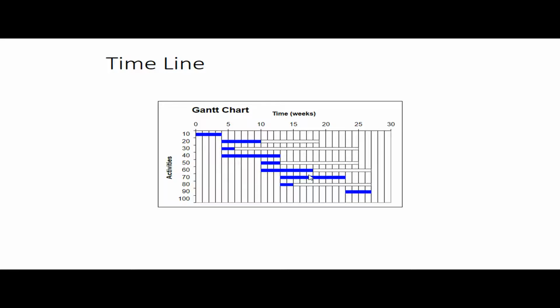A timeline, which is my third example, is typical of what you get when you study project management, where it shows the activities of the project, the duration of each activity, where the timeline is expressed in weeks, and these are the names of the activities. If you study project management, you know that activities can be critical or non-critical. Critical means if it is delayed by, say, 1 week, the completion time will be delayed by 1 week.